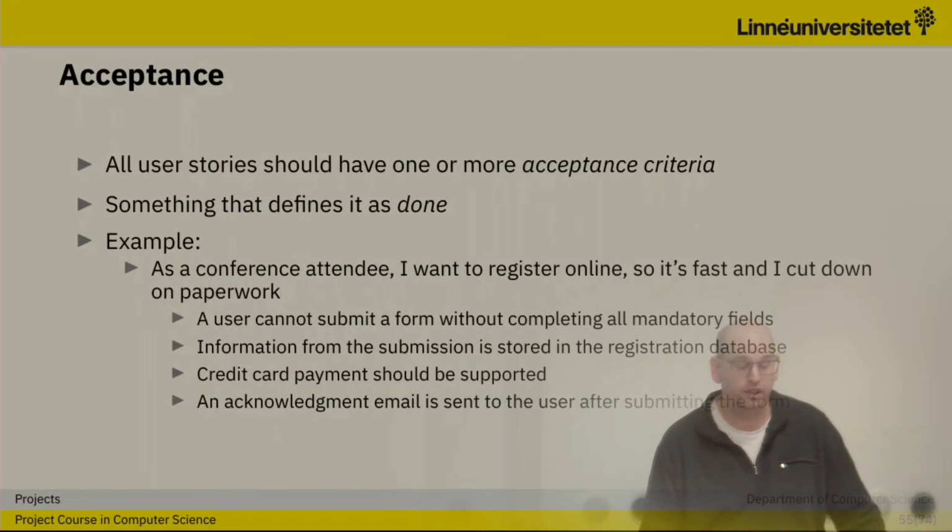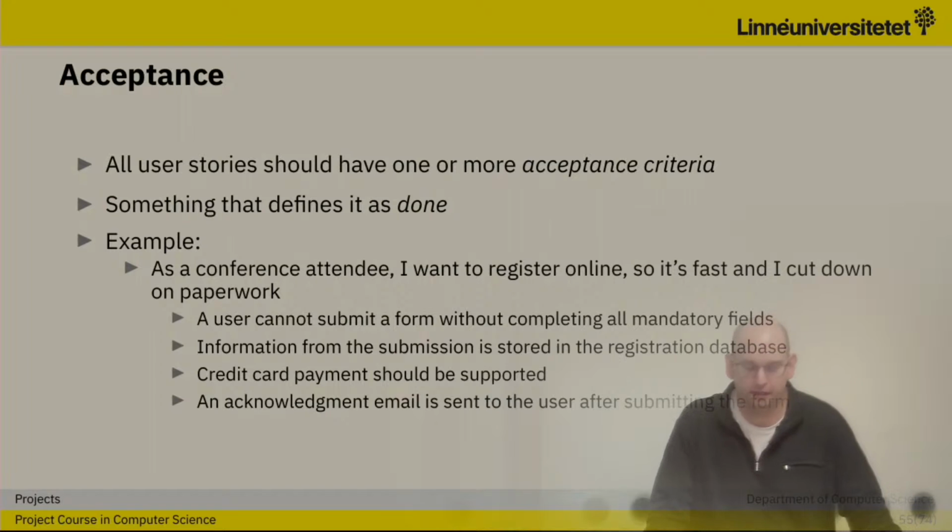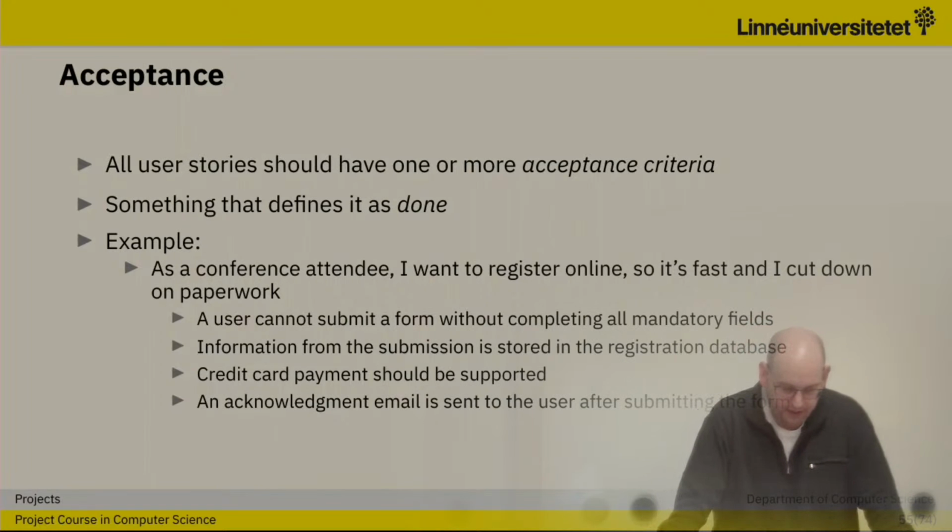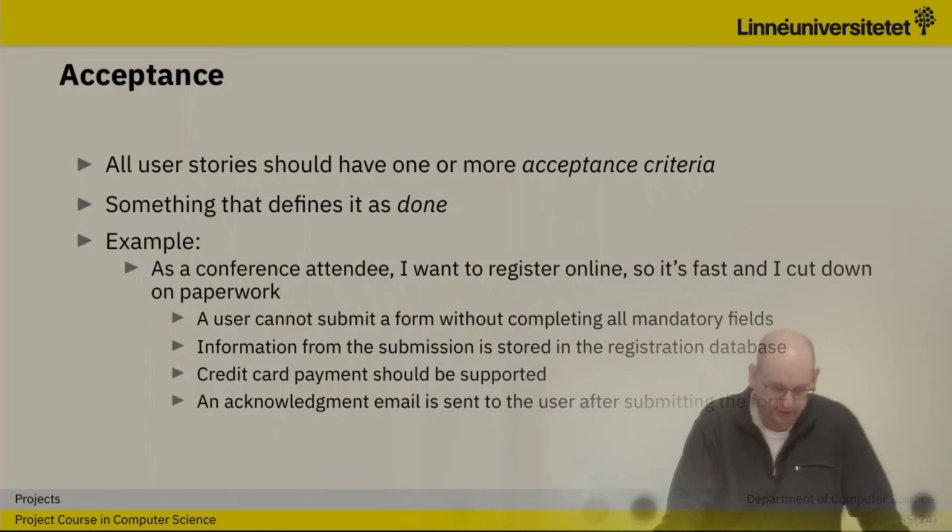And we have another example, I think we've said that enough now, but just to make it certain. As a conference attendee, I want to register online so it's fast and I can cut down on paperwork. So that entails, for example, that a user cannot submit a form without completing all the mandatory fields. Information from the submission is stored in the registration database. Credit card payment should be supported, and an acknowledgement email should be sent to the user after submitting the form.